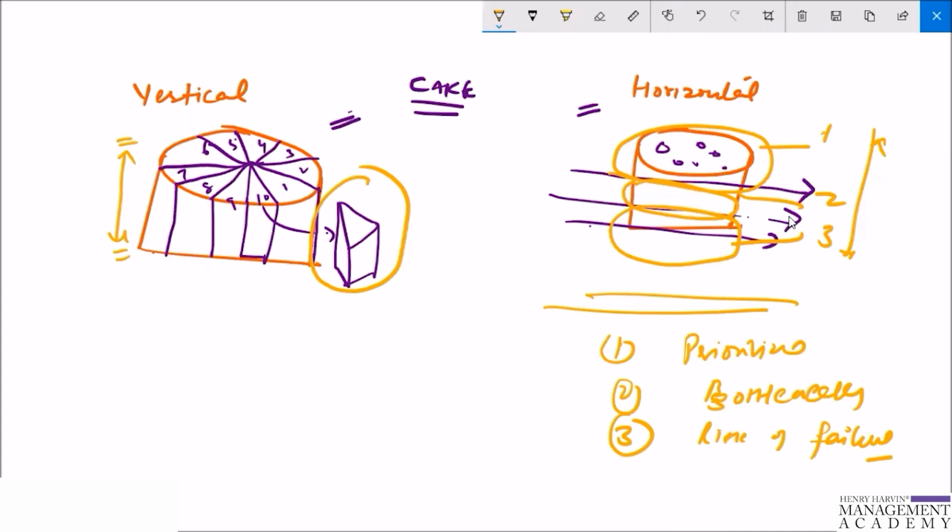And so if the user story is, for example, as a customer, I can pay for my orders so I can get my product, it can be broken down into smaller user stories, like as a customer I want to pay by wire transfer so I can get my product, or as a customer I can pay with a credit card so I can get my product. So the metaphor will further clarify the difference.